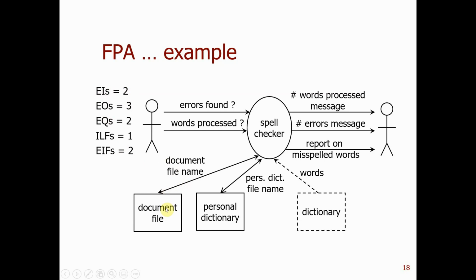The first impression that comes to your mind, you may consider the document file and the personal dictionary file are external input. Actually, no. The answer is no. These two files are external interface files. So here we have two external interface files.